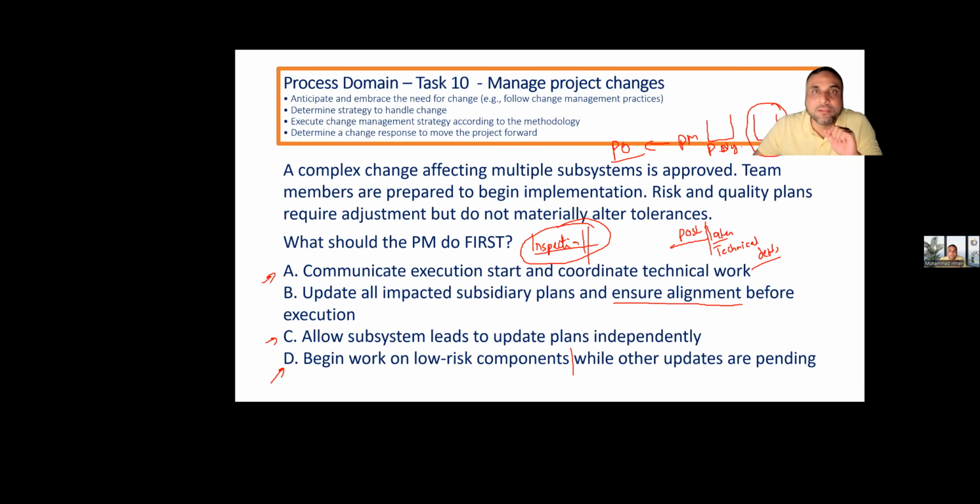They will terminate the iteration in a situation where business objectives cannot be achieved, or where a new critical risk is arising which can be dangerous. So it's beyond the product backlog, right?